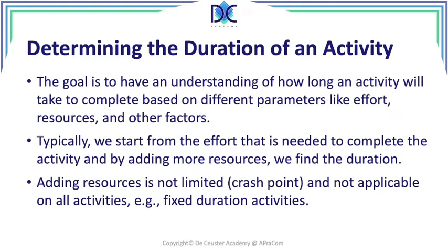Another element we have to take into account is the type of activities. We have fixed duration activities, which will always take a certain time, whatever the amount of resources we add to that activity. So we have to be sure whether the duration of the activity is determined by the number of resources that will be allocated to it.